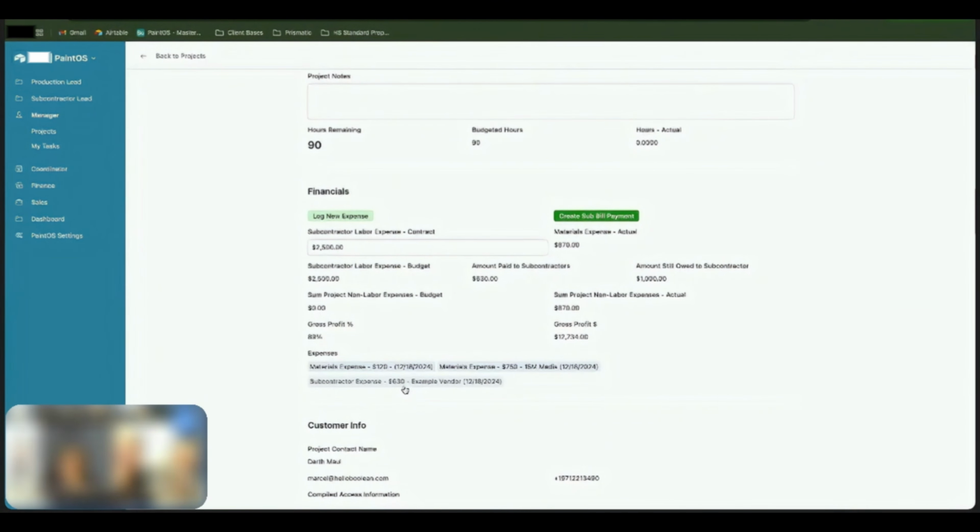If we overpay it on purpose, which happens, like we give them a PO and I'm like, I'm gonna give an extra $200 for this, will there be any issues with that in here? We'll work through if we're going to change that field here, the labor contract expense, or what Chris was saying is if we do a change order, $0 to the customer, but a change order to the sub, it would update that number from 2,500 to 2,700 and it would balance it out.